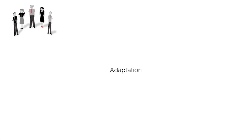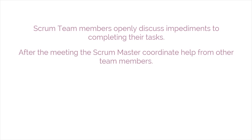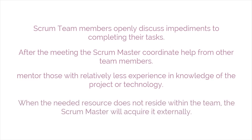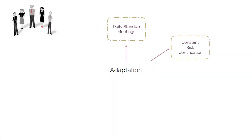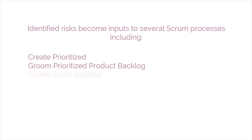Some examples of adaptation include the following. In daily stand-up meetings, Scrum team members openly discuss impediments to completing their tasks. After the meeting, the Scrum Master coordinates help from other team members. More experienced members also mentor those with relatively less experience and knowledge of the project or technology. When the needed resource doesn't reside within the team, the Scrum Master will acquire it externally. Risk identification is performed and iterated throughout the project, and identified risks become inputs to several Scrum processes, including Create Prioritized Product Backlog, Groom Prioritized Product Backlog, and Create Sprint Backlog.